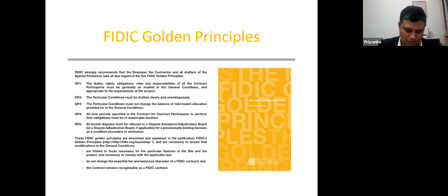Now, if you see this particular FIDIC Red Book 2017 version, the clause, I think 13.1, no, 8.1. 8.1 is related to the commencement of the works. The commencement of the works says, within 42 days after issue of the letter of acceptance the contractor has to commence the works, right? And there are certain time periods which are stipulated by looking at the reasonability. Now, for example, the base date which is indicated within the FIDIC Red Book is 28 days before the tender submission.